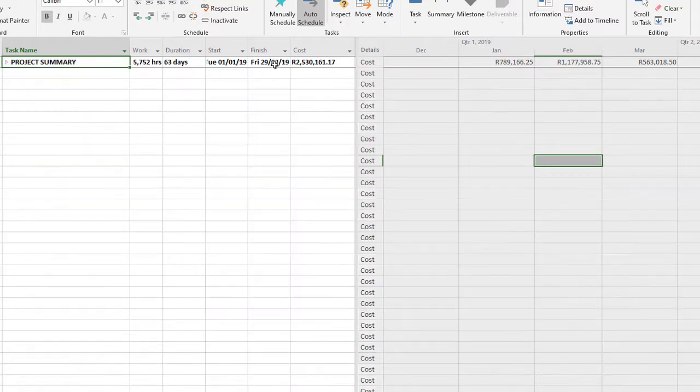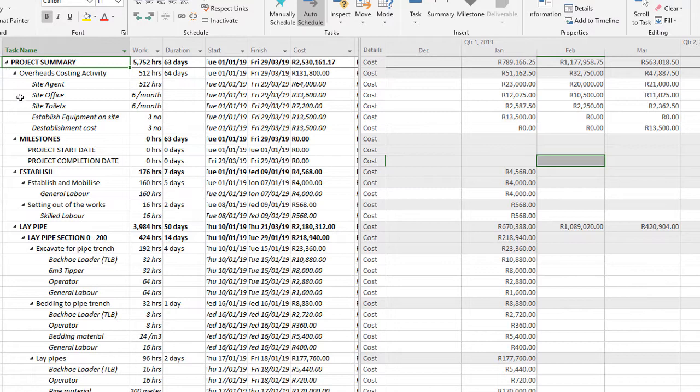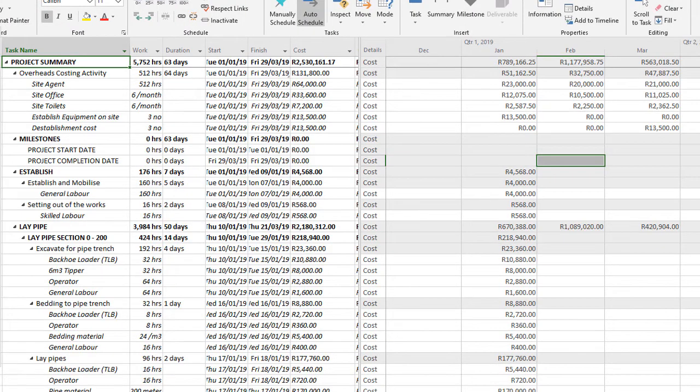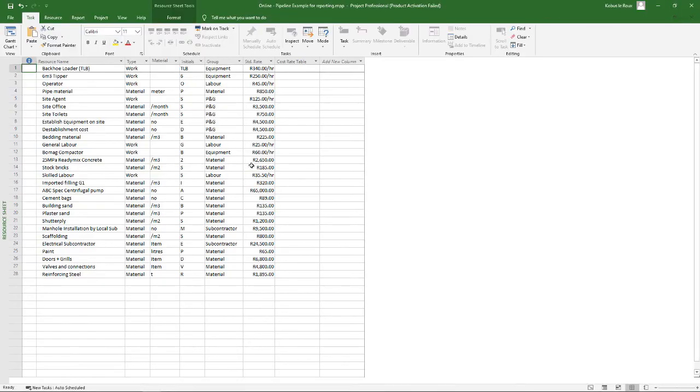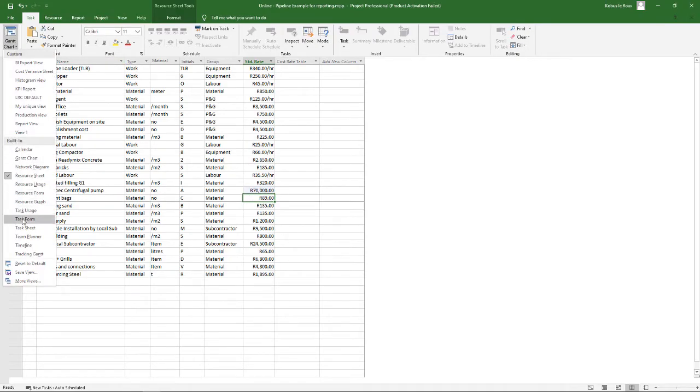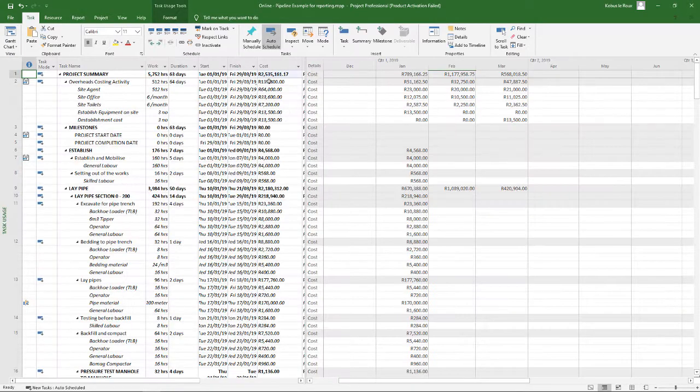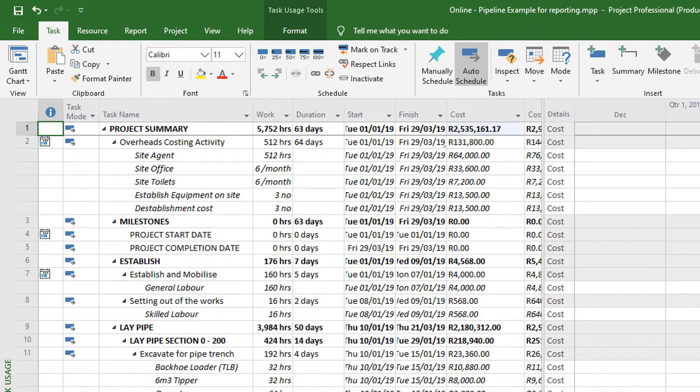And that now becomes my lump sum tender price, 2.5 million. You can see it's very well thought through, very well structured in my schedule. And in future, you can reuse your resource sheet and simply adjust the rates. Once I adjust the rate over here, it'll filter through to my Gantt chart view or the task usage, and it'll change. The change now is 2.35 million due to that change that I just made.